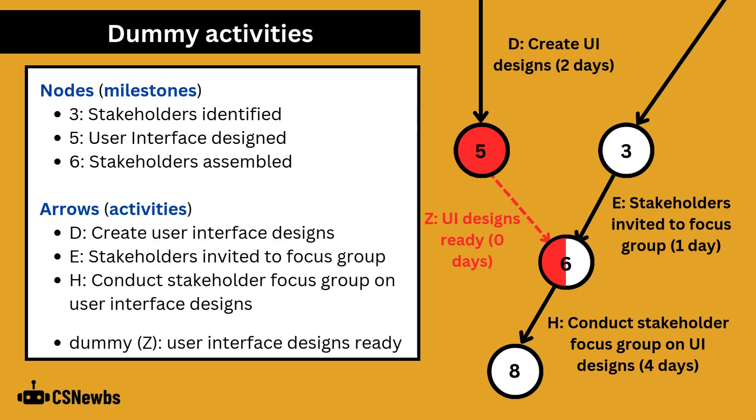There is no further time-consuming action between node 5 and 6 but moving on from 6 and starting activity H requires both activity E and the dummy activity of having the designs ready at milestone 5 to have been reached.